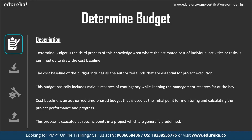Risk identification happens in the risk management knowledge area — identifying, assessing, analyzing risks, and defining risk responses. The cost of risk responses is included as a contingency reserve, consolidated upward in the WBS structure. Adding the contingency reserve to all effort and material costs becomes the cost baseline. Above this is the management reserve, which the project manager cannot use freely — it is calculated by management to handle unknown risks and unforeseen circumstances.